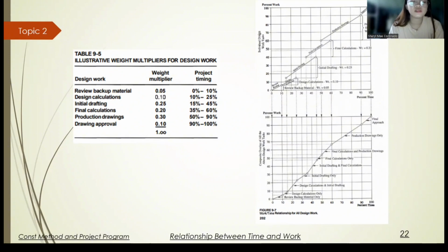The timing of design work depends upon the availability of personnel. This information can be compiled from a summary of the individual design work packages. To manage the overall design effort, a work or time curve can be developed from the information in Table 9-5.